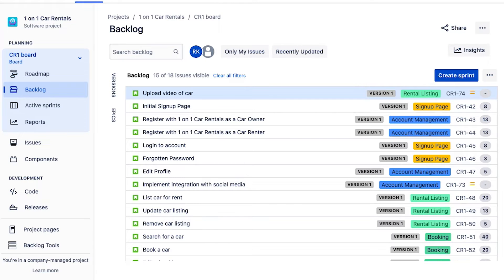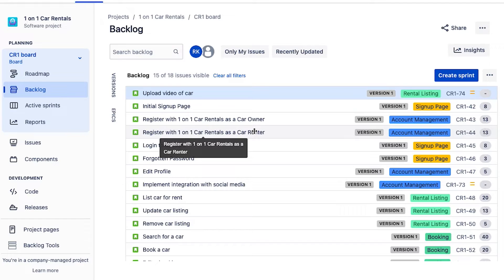Before we get into sprint planning with JIRA, there are a couple of details you'll want to have prepared coming into the sprint planning session. First, make sure your product owner has prioritized the product backlog items and added a sufficient level of detail — this ensures the team has a clear understanding of what needs to be done. Second, make sure the team's capacity has been determined, either in terms of time or what's called velocity, so we can understand how much work they can fit into the upcoming sprint. For more on that topic, check out my in-depth video series on sprint planning.